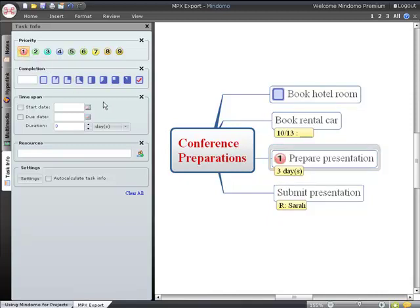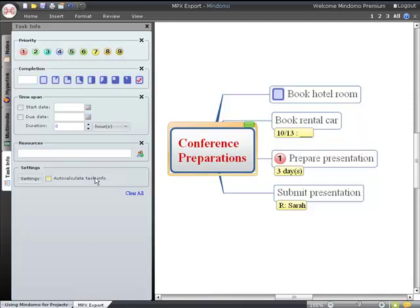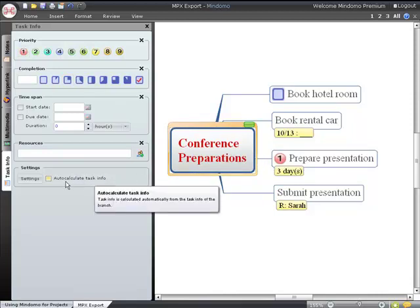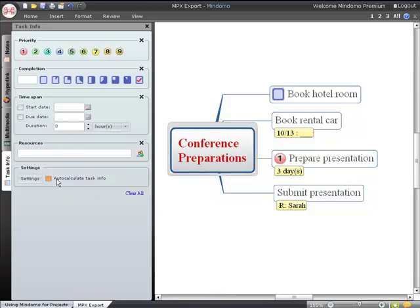If you select a topic and check the auto-calculate task info box, Mindomo will roll up the task information from the subtopics underneath to give you the longest project date or the average percent complete.